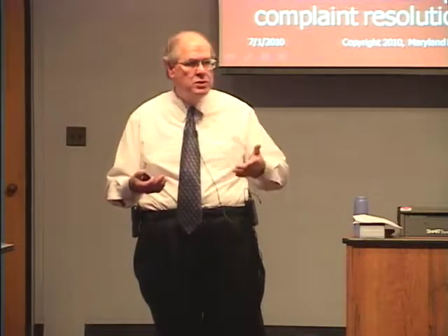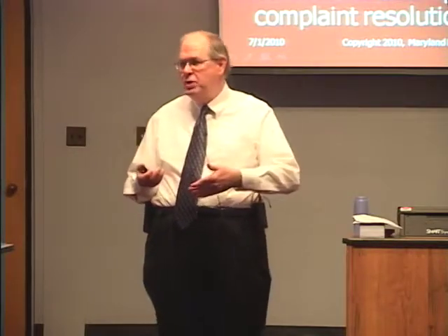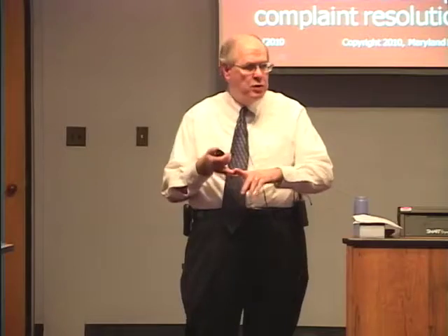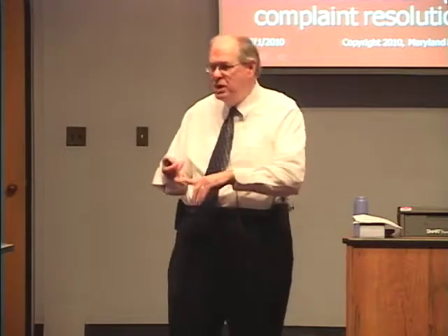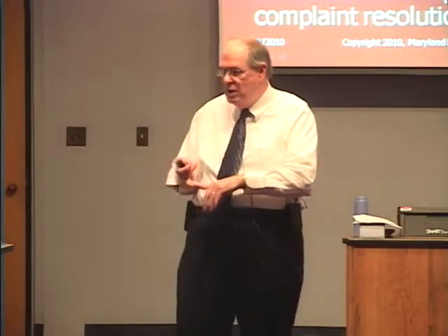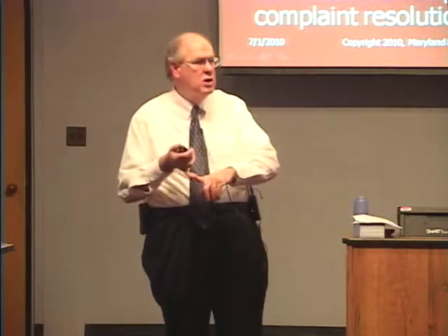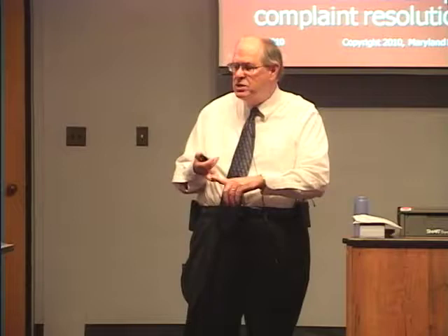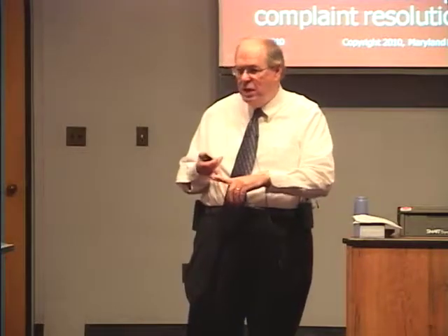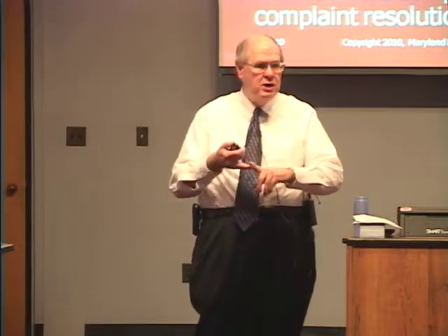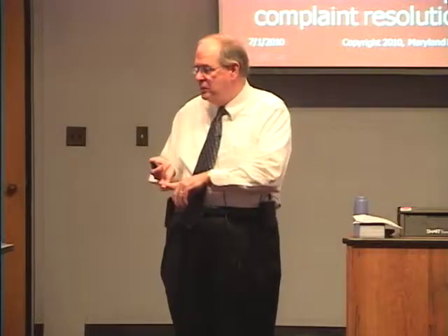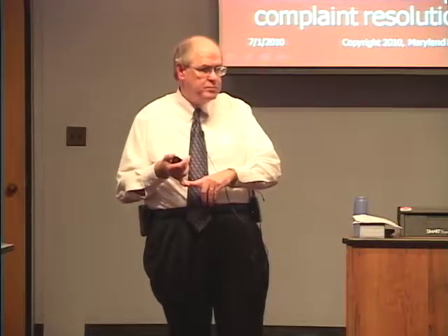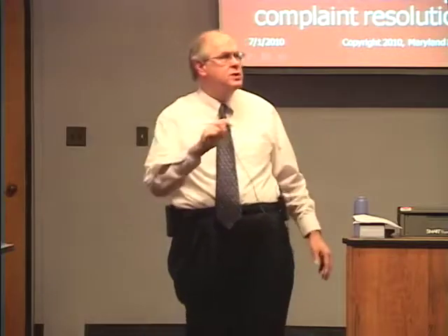So probably what you'll do is look at, are there complaints? And you will have standards for what is appropriate for complaints to measure whether a vendor is performing. You will have a standard that says this is an okay number of complaints, this is an excessive level of complaints. And the more complaints, then by extension, the worse the vendor is doing. Fewer complaints, presumption, the better the contractor is doing. So that's just an illustration.